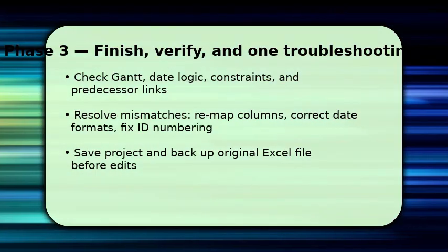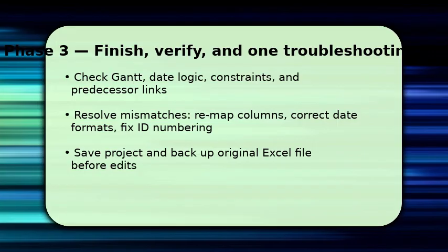You finish by validating the project so the schedule behaves correctly. Scan the Gantt to confirm dates, durations, and predecessor links. Make sure constraints and calendars match your intent.